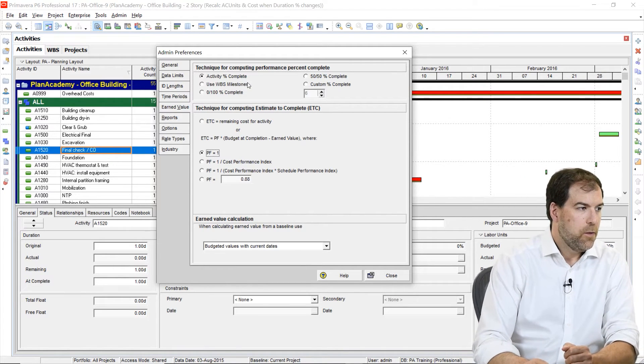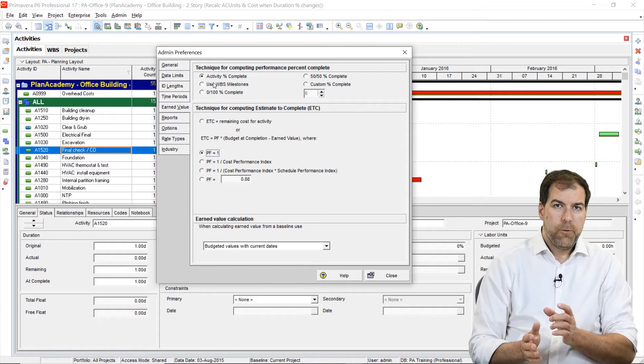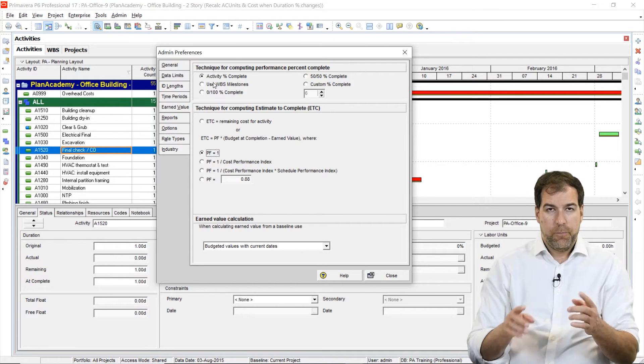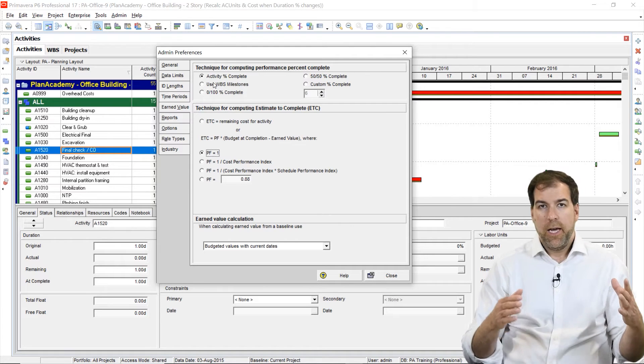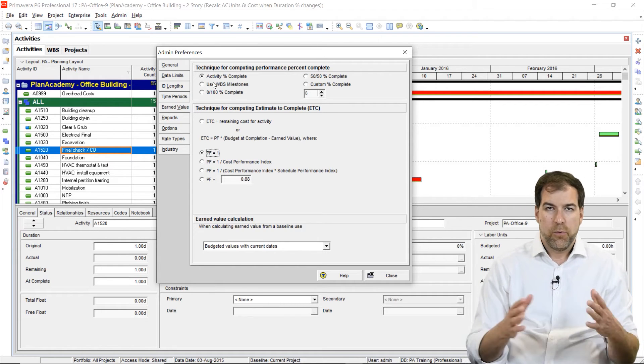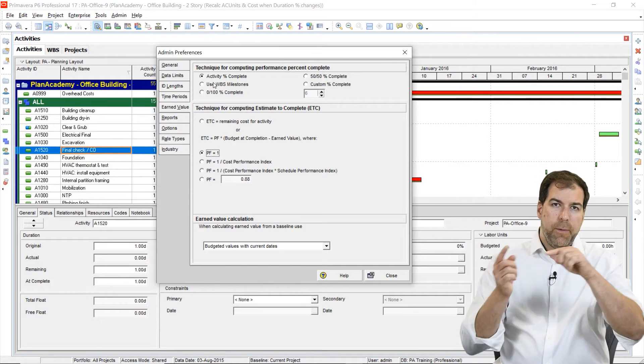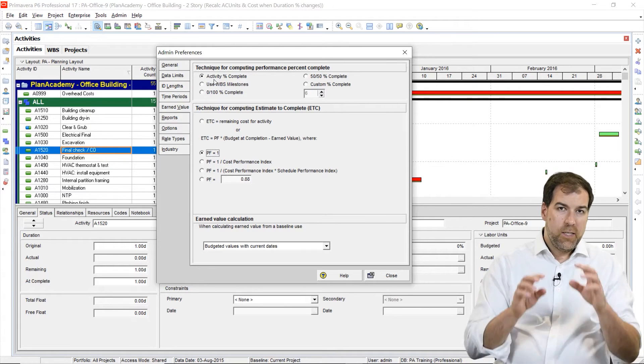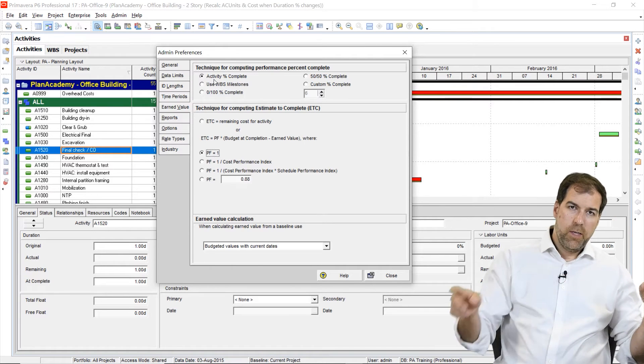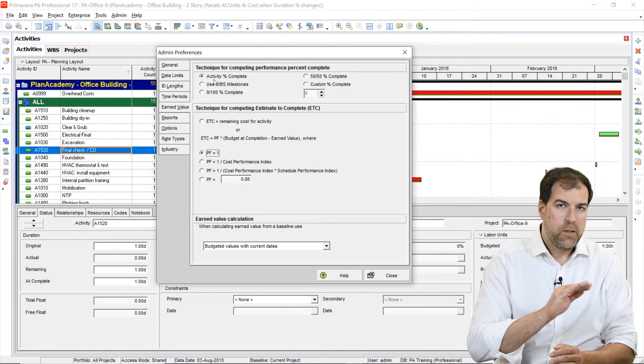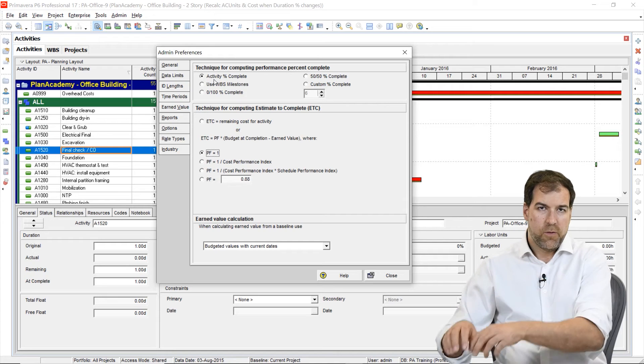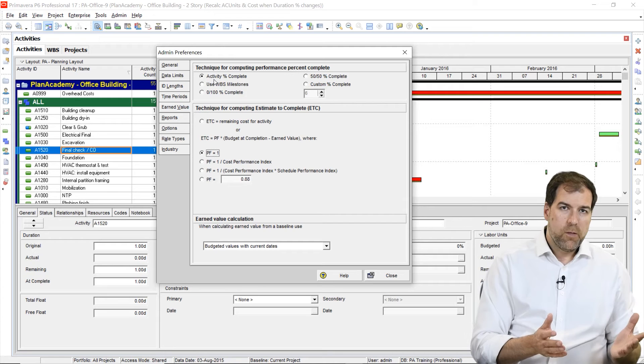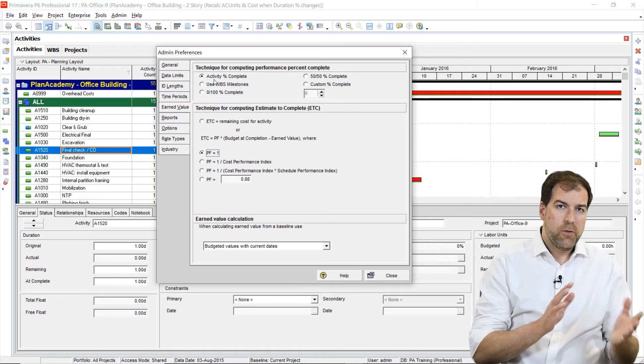Okay, so let's talk about the first option. It says use activity percent complete. Activity percent complete is a field in P6 and it actually is driven by the percent complete that you put on an activity. So if I say an activity having spent four days and still another two days, I can manually input a physical percent complete or I can have P6 use the duration. Whatever happens there at the activity level gets copied into this field called activity percent complete. And then this setting here says, let's take that and copy it into performance percent complete. So the same percent complete value gets copied twice. Okay, I'll let you know this is the way most of us opt to go when we're using earned value in Primavera P6. Let's let the percent complete that we use at the activity level drive the performance percent complete of the project. So this is my recommendation. I do recommend you go this way, but let's understand the other options.